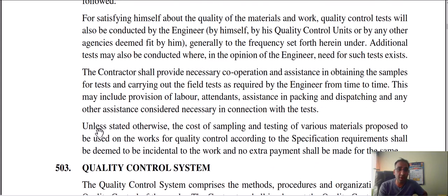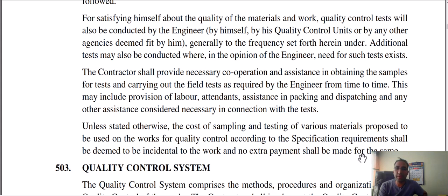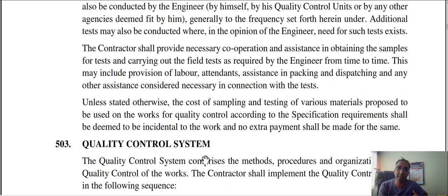The cost for sampling and testing of various materials proposed to be used on the work, for quality control according to specification requirements, shall be deemed to be incidental to the work. No extra payment shall be made for the same. Specification requirements shall be deemed to be incidental to the work.